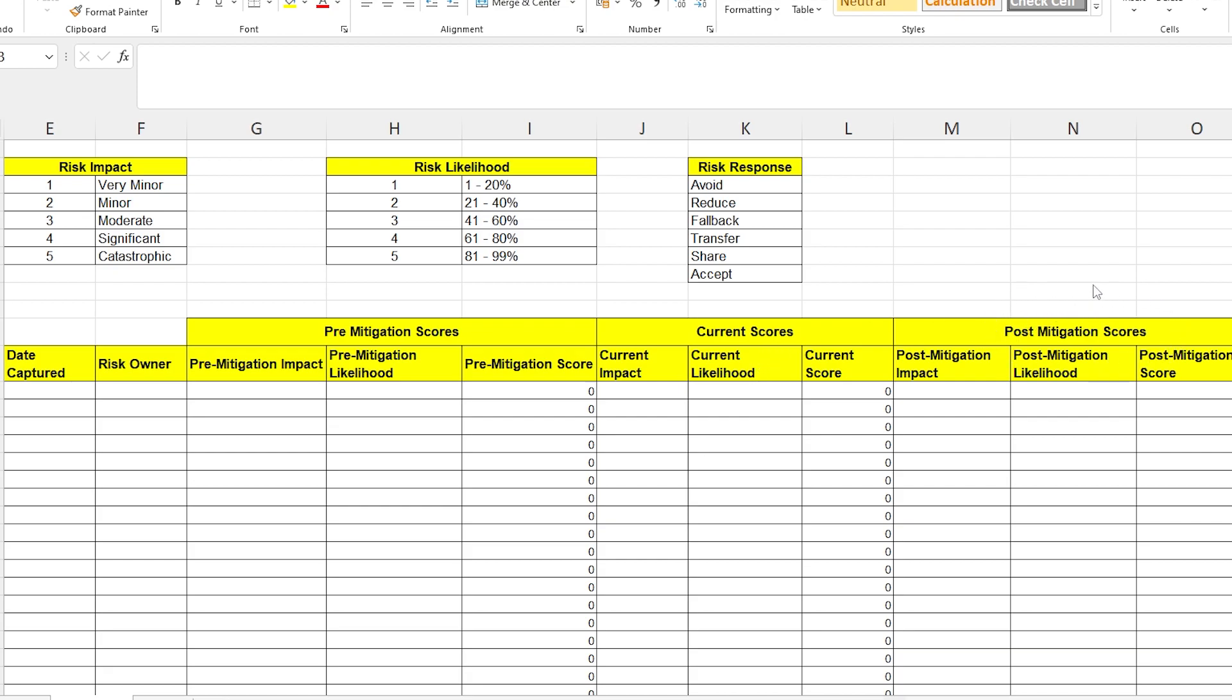And what this covers is the target score that you want to get that risk managed down to. It's not unusual for an organization to only be interested in one of these scores, usually the current score. I have worked at places where the current score and the post-mitigation score is all the people are interested in. Feel free to use this template however you see fit. You can delete these columns or you can hide them depending on the needs of the business. If you're working somewhere that doesn't have too much oversight and there aren't established standards and templates for doing this, my recommendation is that you use all of these columns. It's always better to have a little bit more information than you think you need. Because I can tell you, it is very difficult to go backwards in time and try to remember what pre-mitigation scores were.